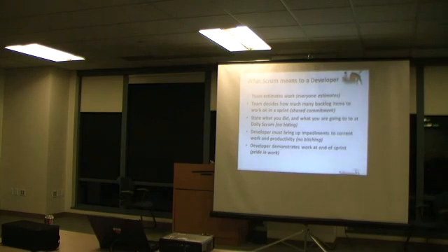When I teach it, we say a story should be no more than half a sprint long as an estimate. Half a sprint. And that means if you blew your estimate, you're still probably going to get that story done in the iteration. Because what you don't want to do is have a story span the iteration.